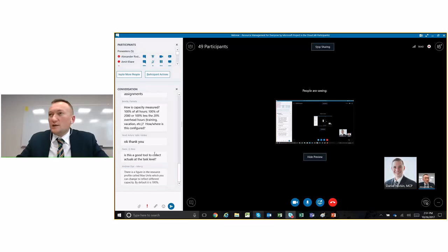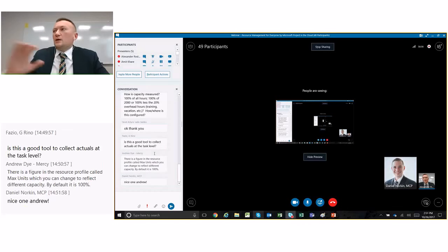You can say that in 2017 this person's max units is 100%, but starting from January 1st, 2018, this person's max units is going to go down to 80%, and then go up in, let's say, July the next year. Or maybe this person is going to be on sabbatical for 3 months, so you probably want to reduce their max units to 0 for the period of that vacation.